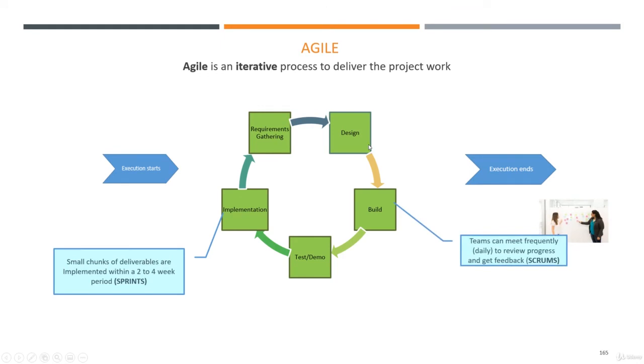Now during design, build, and also test, the teams meet very frequently. They call that daily stand-ups, or scrums, to review progress and get feedback. So the whole idea is very interactive between the business, the business analyst, the developer, and the tester. They all go in front of a whiteboard, and they say, well, what do we do for the next implementation here? And they obviously have a backlog, and they decide what they will do this time, and they review what happened in the previous day and what they're planning to do the next day. So it's very interactive, if you like.